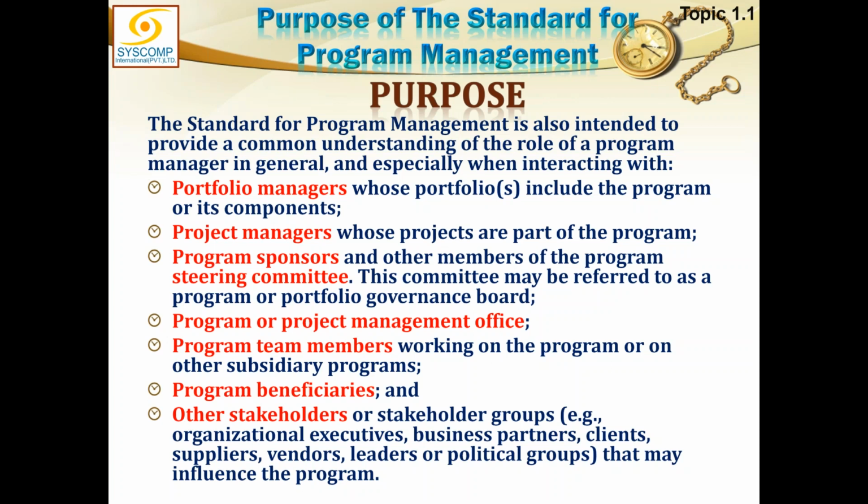So the portfolio would be responsible for prioritizing these projects and programs, and for resource distribution according to that prioritization, and money is also a resource. And therefore, if your project or your program is not in the priority of the portfolio, your funding may be cut and your project or program may be finished. It may be ended by the portfolio manager without even asking.